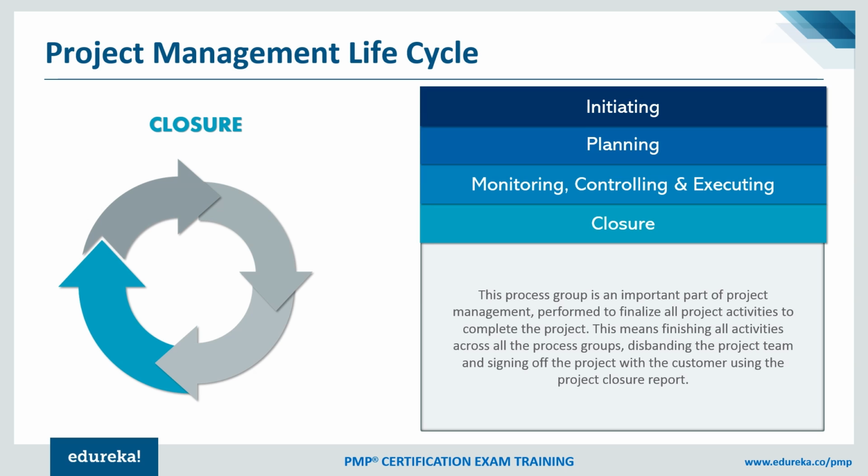A few key activities we do in closure start with releasing the resources. When you start your project, you may take resources from various teams inside your office or maybe even from a few outside vendors. So when we come to closure, we also release the resources. And before release, we want to make sure any lessons learned which are not documented so far are documented. We archive these documents, ensure the payments are scheduled and the formal sign-offs have happened with the clients and vendors. So that's something done towards the closure. And finally, we might release a project report as well. That's the activity done on the closure side.